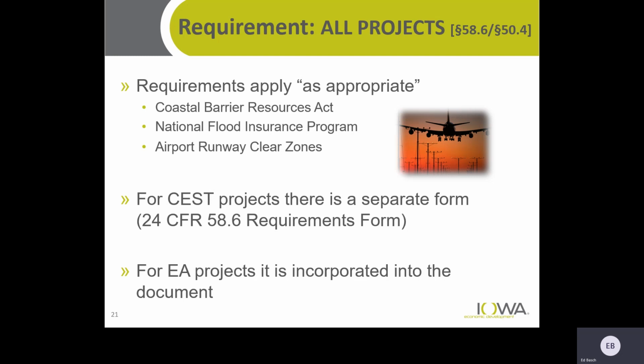National Flood Insurance Program doesn't apply if you're not in a floodplain, and airport runway clear zones don't apply unless you're within a certain distance of an airport. So those are three examples, but again, as you go through individual projects, many of these factors will not apply. Some will, and the key is finding the ones that do and addressing those.